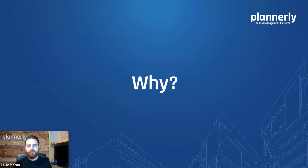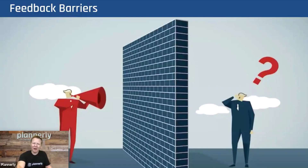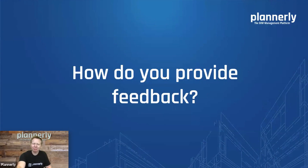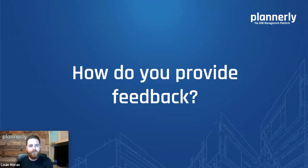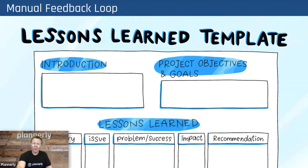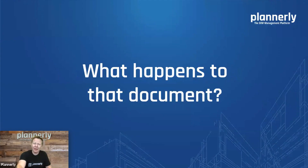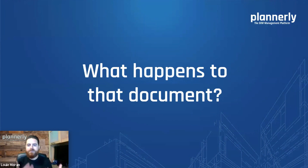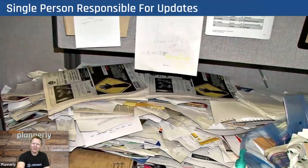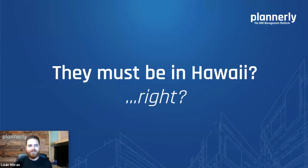Why is that? Well, when we provide feedback there are barriers to incorporating it, and barriers in general to keeping things up to date — lots of standards around the world and lots of different ways of doing things. The feedback loop is a pretty manual process: we have a lessons learned template, a very manual form that we send back to somebody. And then what happens to that document? Not sure really, because there's only one or two people responsible for the update.